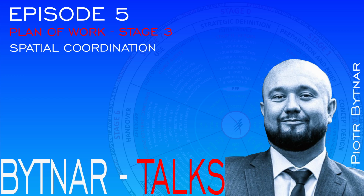Another very important part here is, as I think you can already gather from what's involved within that stage, we're not going into the nitty-gritty of every single thing. We're talking about a major aspect of the development that need to be coordinated and agreed upon within this stage. So it is very important, and it is point 3 to consider on my list, is to identify all of the specialist items, all of those specialist things that will need to be designed later on.